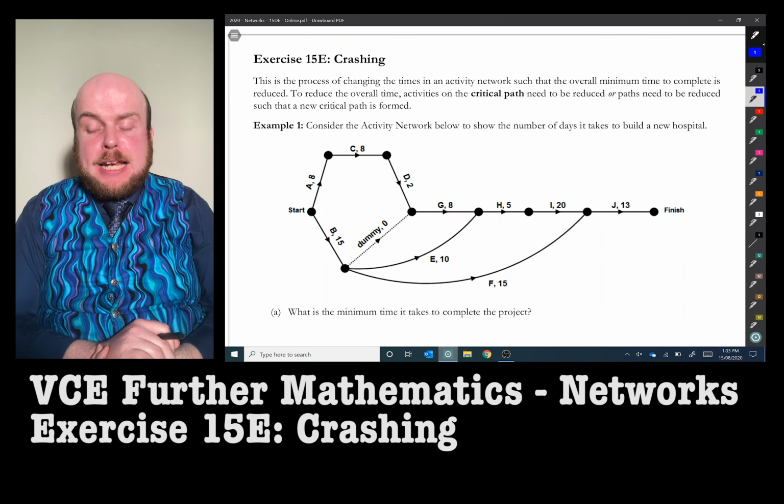For the next one, my choices will be 15 plus 8, which will be 23, or 15 plus 5, which is equal to 20. So we either have a choice of 23 or 20. And of course, we have to go with the slowest path, so 23. At this vertex, originally it was 31. So we've got 23 plus 5, which is 28.